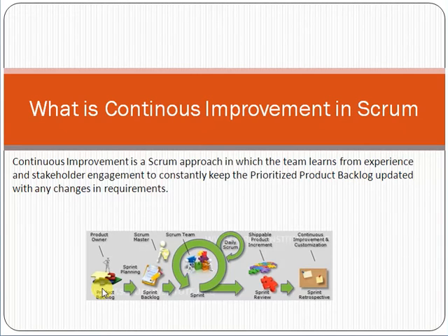After the sprint review meeting, we do the sprint retrospective session. This session is based totally on learning experiences, in which we discuss what went right, what went wrong, how we should improve our procedures, and what we shouldn't have to do. In the retrospective session, you do the discussion, you review your procedures, your implementation approach, your product, and the task which you have delivered to customers.